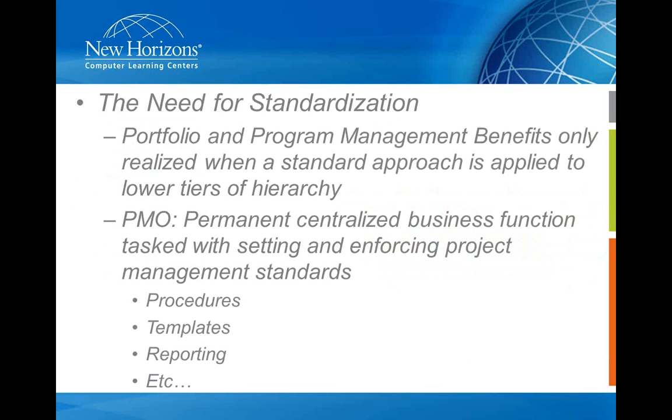When you do that, how do you compare them? You can't even bring them up in the same screen. You're not comparing apples to apples. You're comparing apples to horse carts. That's not going to work. I need standardization in the way the projects are performed. What tools are used, what software, where the data is kept, how the metrics are generated, which metrics are used. Or good luck tracking those benefits and making good sound business decisions based on the data. If I can't compare and contrast how the different projects are doing, then I'm not going to be very good at program management.